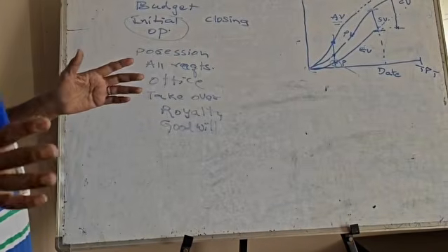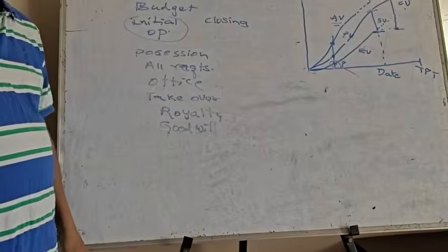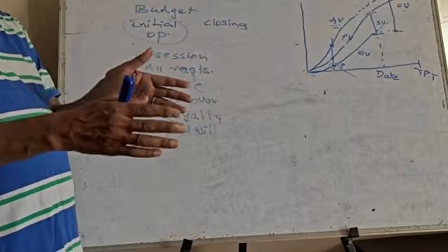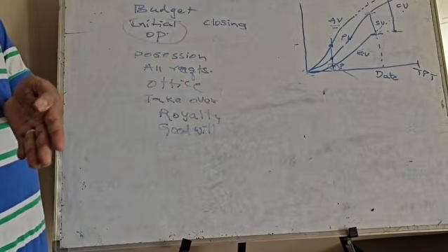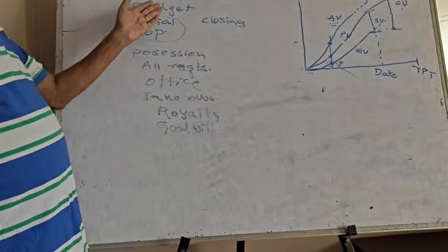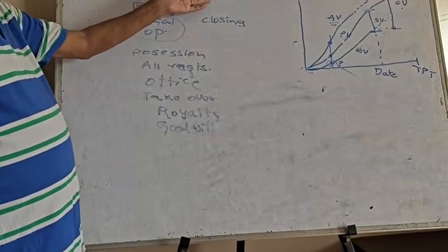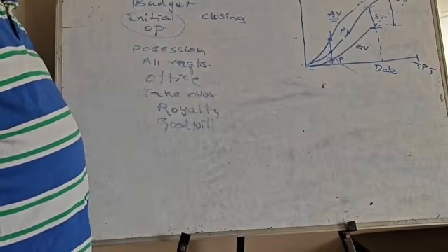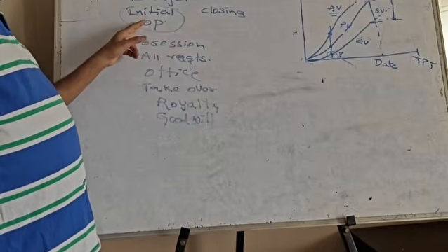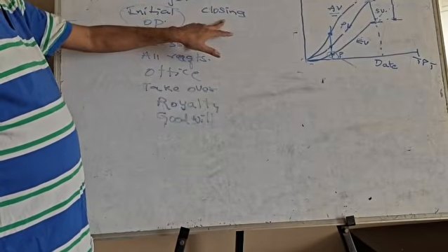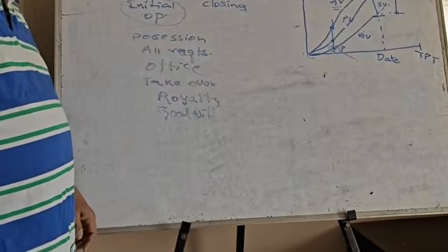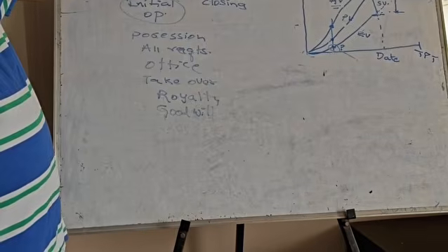So cash flow will be like a register. For example, you go to a bank, there will be a statement where date will be there and some activity will be there. Then you have the debit, credit and balance. The same way, cash flow for a project also, they have to maintain an accounts register, and in this they have to say what is the initial budget, what was the opening balance and what was the closing balance. Every day they have to see. This will always be reported to the client. The cash flow will be reported to the client.